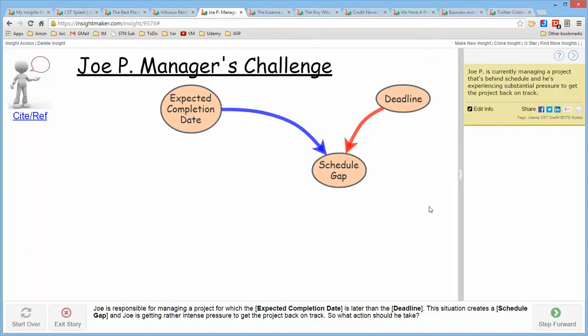It's a very simple approach in terms of you only have to ask two questions. You can start anywhere. And if I start with schedule gap, the question I ask is what influences the schedule gap? Well, the given deadline and the current expected completion date influence the schedule gap.